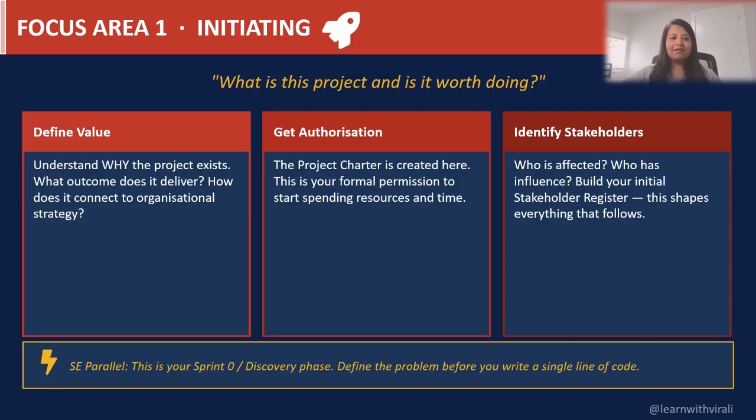Second is to get authorization. So this is where the project charter lives. In PMBOK 8, the charter is your formal permission to begin spending the resources. So that means if you do not have a charter for your project, you cannot begin the project. So no charter, no project.